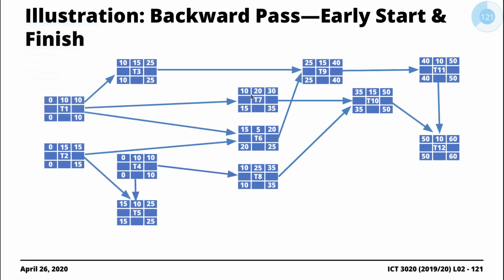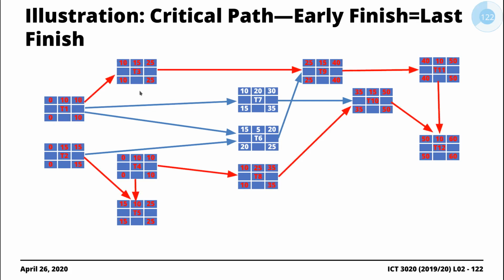So how do you identify the critical path? Well, we just identify the activities which have the same values for the early start, late start, and early finish, late finish. So if these numbers are the same, the activities whose numbers are equal will form the critical path. Observe. If you follow through with this path, all the activities along this path have similar values top to bottom, right? Same goes for this path here, this path, and this path here, right?